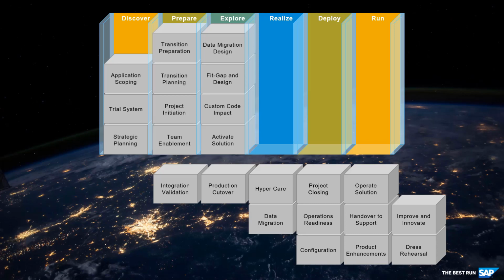For a new implementation, a data migration assessment should be run to define the data migration approach and create a strategy document. For selective data transition, an implementation partner or SAP needs to run a landscape transformation assessment. Both scenarios may require additional data migration software.